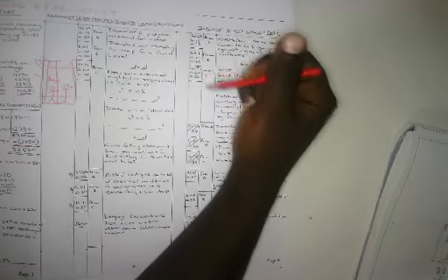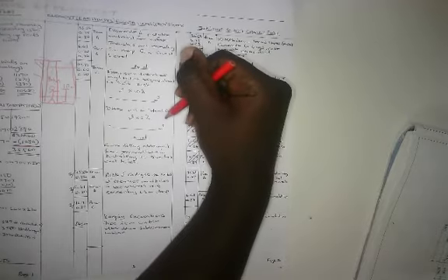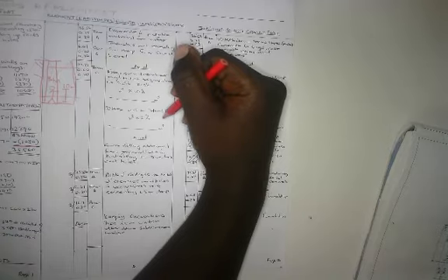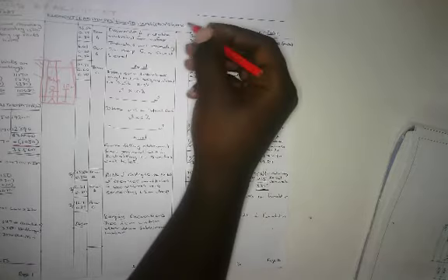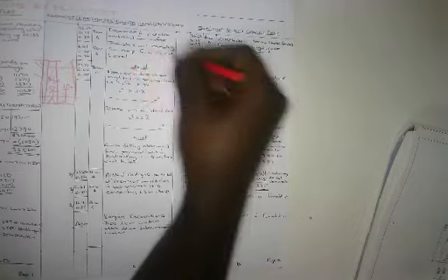If they've provided you a percentage, say 10%, that's how you would annotate that. And then you say ditto, but in hard rock, and then you give the percentage for the hard rock. And then say, and earth filling obtained from excavations for backfilling to trenches and holes.